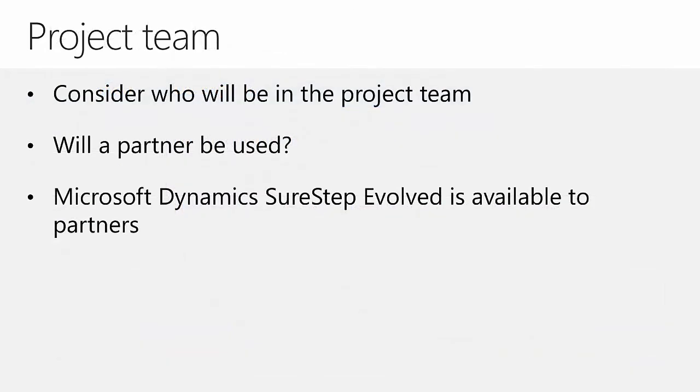Now you're ready to follow best practices, and you have acquired your licenses and your instances are up and ready. But who will be responsible for the project? Sometimes a team of individuals, or one or two individuals fulfilling various roles, will be responsible for the implementation. Roles include business managers who determine how the business uses Microsoft Dynamics 365, including mapping business processes to Dynamics 365, deciding on default values, and identifying any required customizations; customization technical staff who implement the planned customizations; network technical staff who are typically responsible for managing how Dynamics 365 is accessed and administered; and a project manager who manages the project.